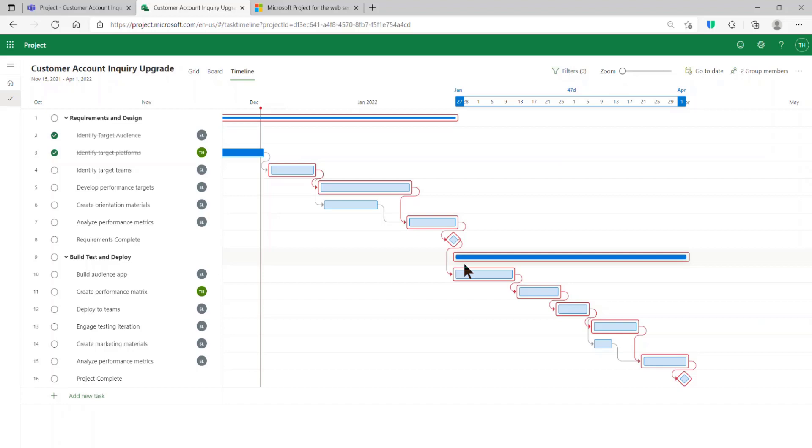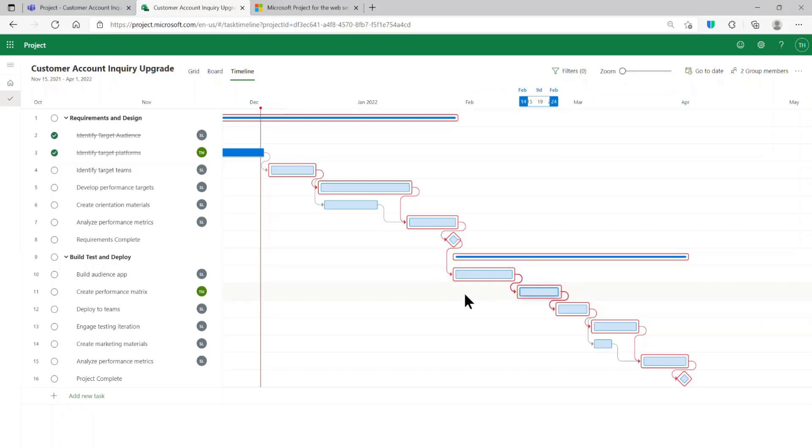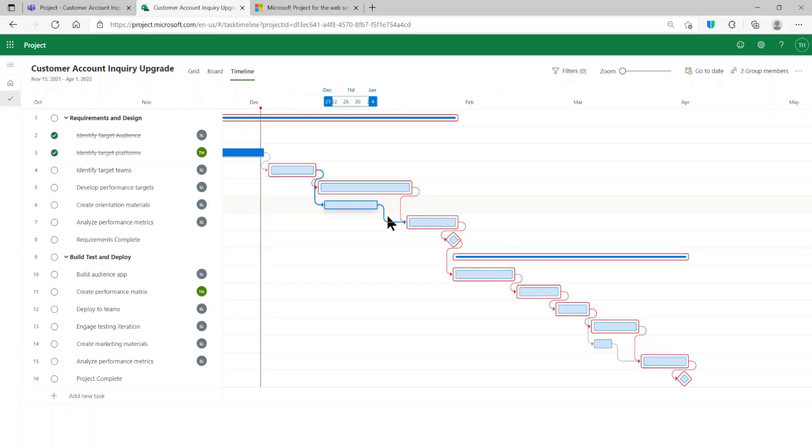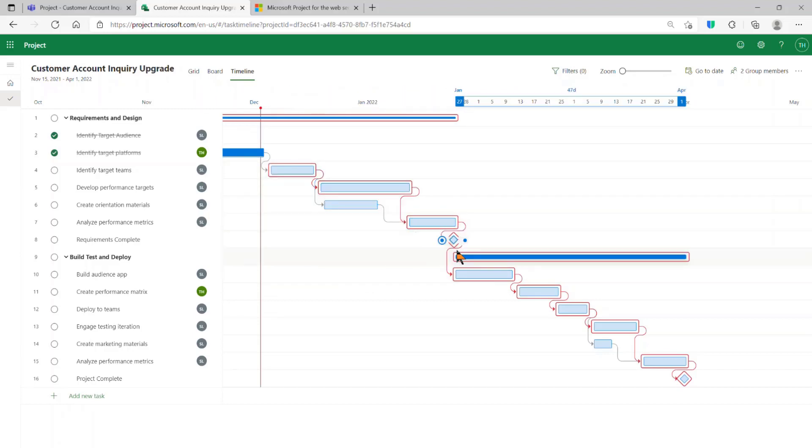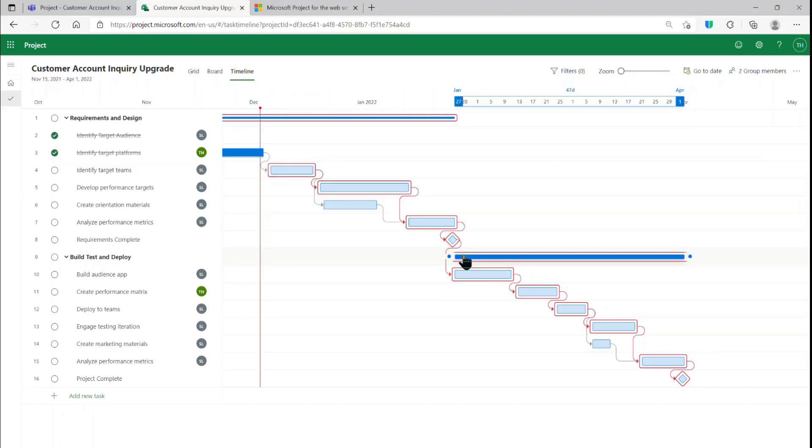but in Project for the Web, you can unlock a great deal of scheduling power if you hold fast to a simple rule. All detailed tasks must be linked completely to other tasks throughout your plan.